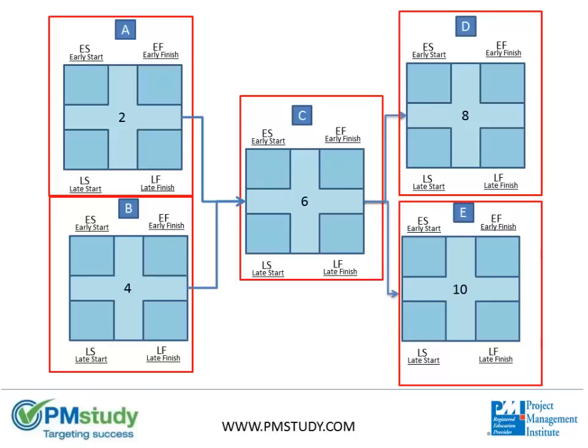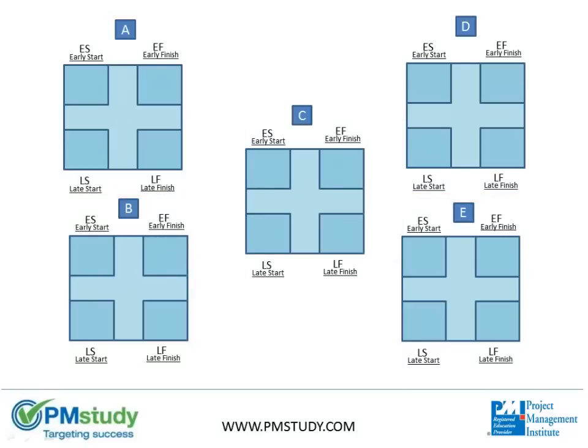This diagram depicts a finish-to-start relationship, which means the predecessor activity must finish before the successor activity, or task, starts. The relationship of these tasks are shown through the arrows. The arrow extending from the end of task A flows to the beginning of task C, depicting A as a predecessor to task C.